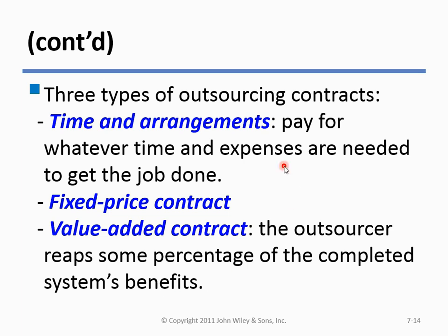And speaking about price, there's contracting arrangements and time and materials. It's probably the most advantageous on the vendor's side, the consultant, right? They just say, I put in this much time, had this many materials, or what we did, here's the bill. You probably get the most flexibility and adaptability out of them, but you need to control that because that can kind of go way, way up. And especially if they're let loose to do what they think might be done as opposed to what you're controlling.